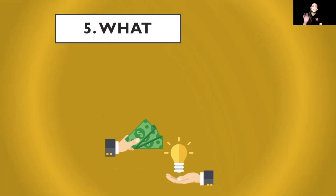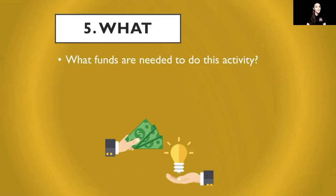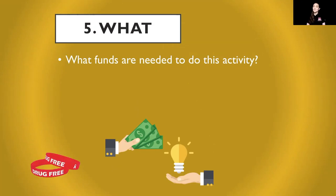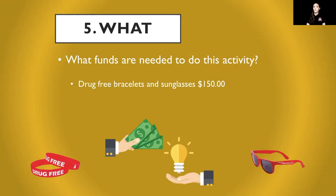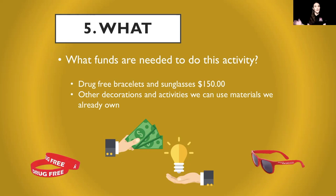The fifth W focuses on 'what funds are needed' to do this activity. For this assembly, since it's focused on drug-free, I'm thinking that we might need to fundraise about $150 to get really cool bracelets and sunglasses. As far as all the other decorations and posters, we can do that using the supplies that are already on school campus.